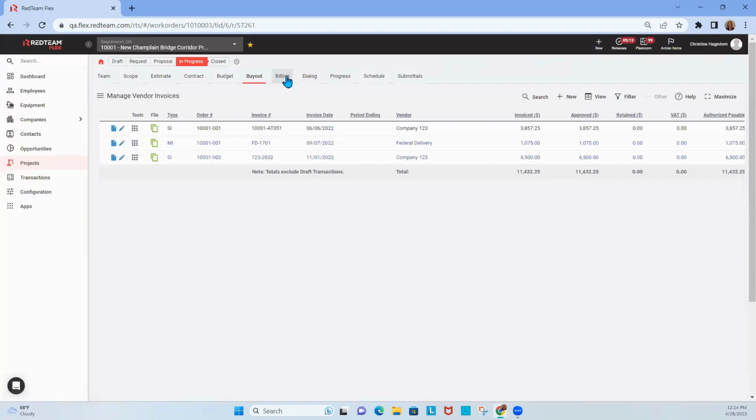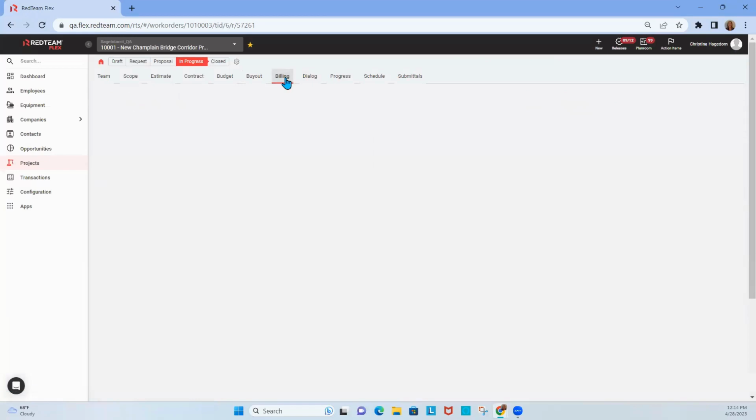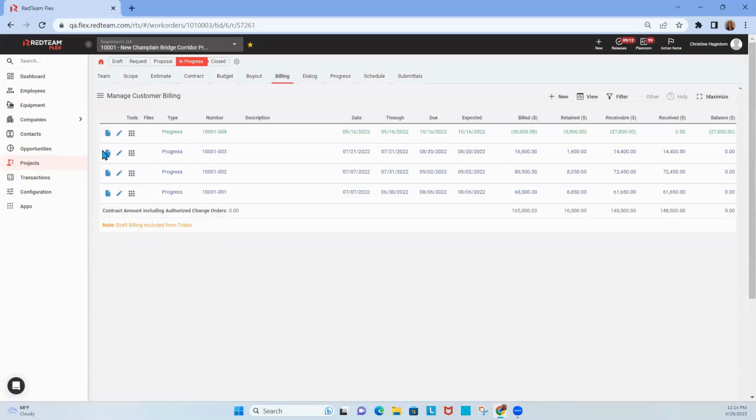Additionally, we have in the billing section that you can now send your progress billing out to your project owner. And you can see here, again, we have some that have moved over, and the blue means that it's already been processed, and we've actually received payments here. When you receive the payments, it does relieve your AP invoices and other related reports. And on this side, it would relieve your aging report.